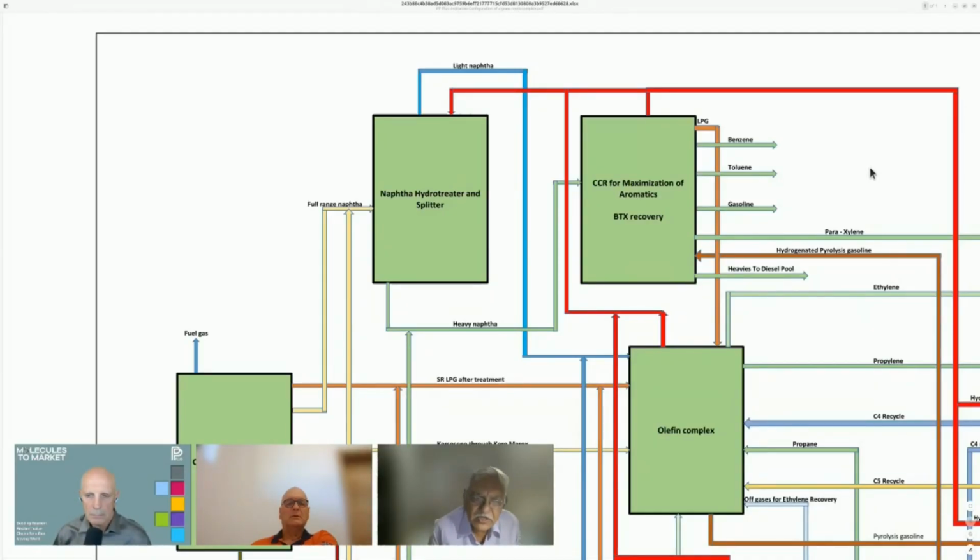Now, come to the one distinct inference which we are drawing from here: if the option is available, it is a good idea to basket all these technologies and go to one agency. And it can be a choice between UOP and Axens. We found this strategy is very good, because there is a lot of standardization which can be achieved in multiple units. Packages become more streamlined.